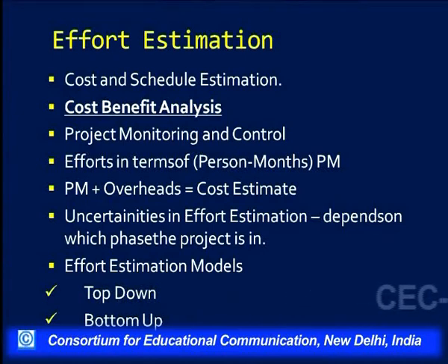Cost estimation is very important because based on this estimation only, a cost benefit analysis of the project can be done. Cost benefit analysis can be done by the customer, because he will understand that if I am paying so much money towards the cost of the project, what are the benefits that are accruing to me. So the cost benefit analysis is only done after the cost estimation has been done by the project manager.